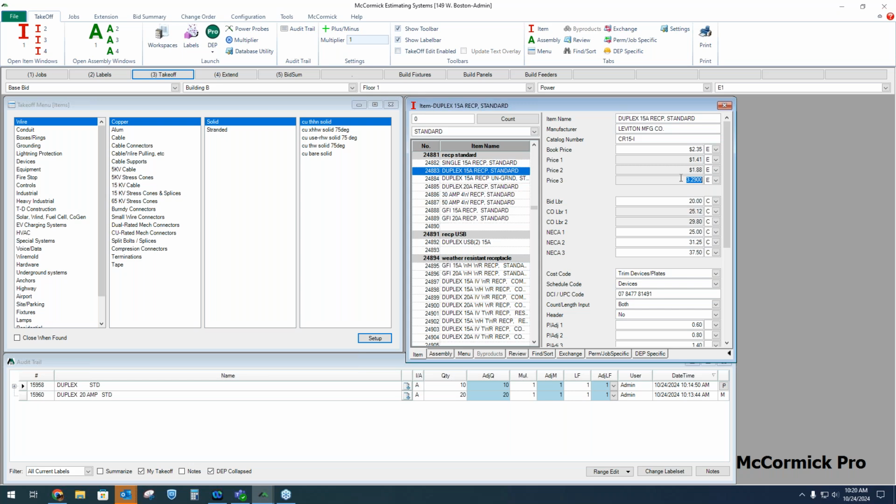In the next step, after we're done with Takeoff, we're going to spit out a complete list of material. We're going to show the material costs and hours associated with the parts. And in the next step, I can also make changes there. And any changes I make in the next step are just for the job. So some users will do Takeoff here, extend, and then spot check pricing in the next step. Or again, we spit out a complete list of material. Some users might just export the whole material list and send it to the supplier, job to job. So these are some ways of doing it.